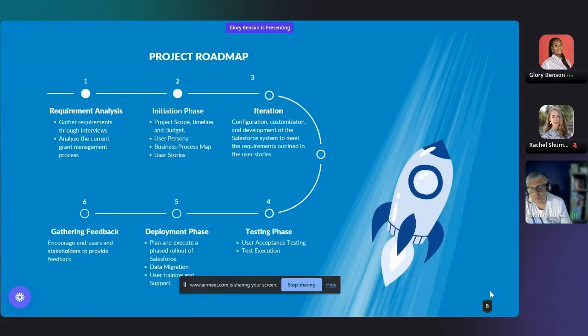When you go through this with a client, it's always worth reiterating what commitment you need from the client. They don't realize that for user acceptance testing, for example, they need to free up people from the business to do the testing. It might be a day, it might be 3 days, it might be six hours a week, whatever it is, but as a BA or a project manager you do need that level of commitment from the client to be able to test the product that you're delivering. So there's some really great content here, but I think what you could do when you present that again is take it one stage further and say, actually, what does that mean for Santiago and his team? What does UAT mean?